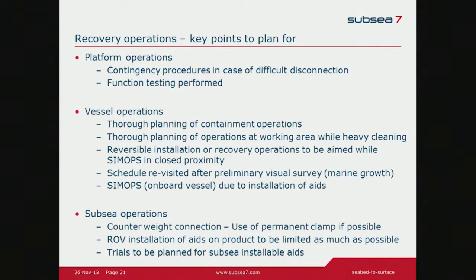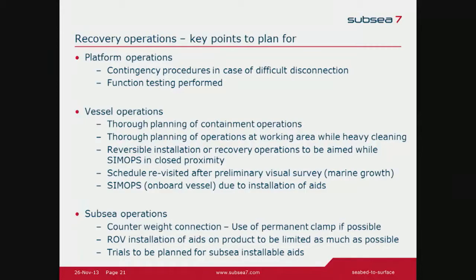Vessel operation: thorough and early planning of containment operations, so that everybody agrees on the method for handling this in case we have a risk of pollution. This is usually a topic which takes time for everyone to agree on. Also thorough planning of operations at the working area while heavy cleaning is going on, because the cleaning operation when we recover risers always takes a lot of personnel, so we need to plan simultaneous operations on board the vessel for doing other work also.